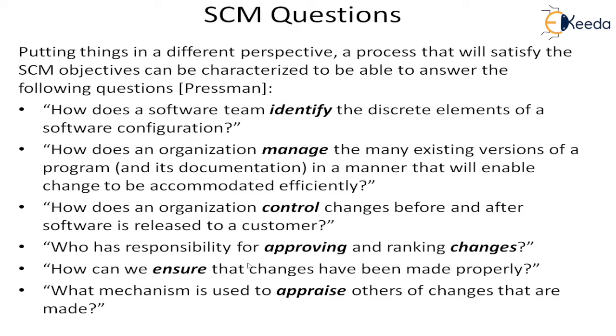Next, who has the responsibility for approving the change? Because we said there has to be an approval process for releasing to the repository. Each time, who will do this and who will rank the changes? Which release will go first? Which release will go next? So there has to be a responsibility assigned, and there has to be an approving procedure.